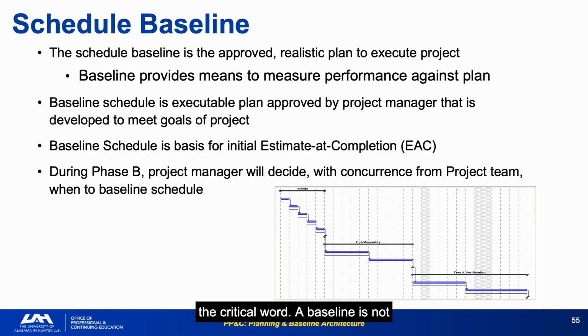A baseline is not realistic because leadership says it is. It is realistic when it has been validated through resource loading, health checks, risk-informed margin, and a credible JCL. "Do not baseline too soon" is important practical advice. A baseline established before the design is sufficiently mature will require immediate rebaselining, which undermines performance measurement integrity and erodes credibility with the review board.